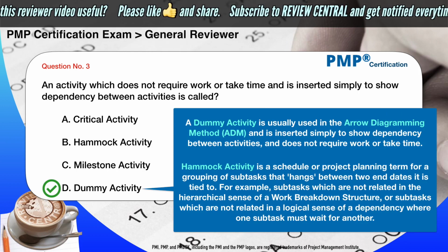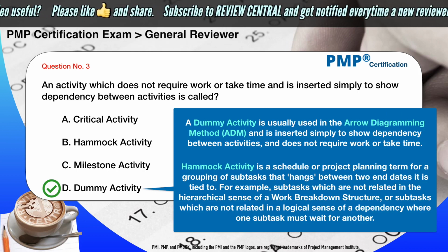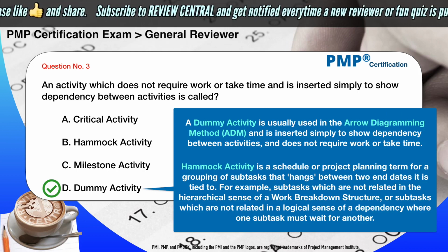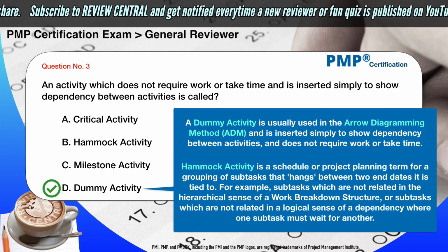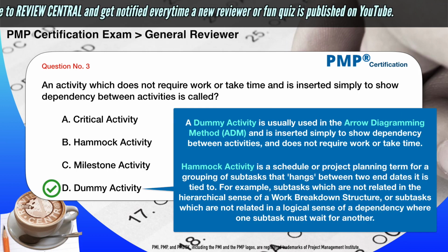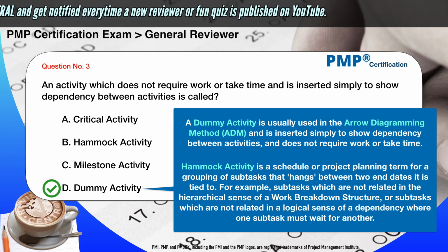The correct answer is D. Dummy activity. A dummy activity is usually used in the arrow diagramming method, or ADM, and is inserted simply to show dependency between activities, and does not require work or take time.